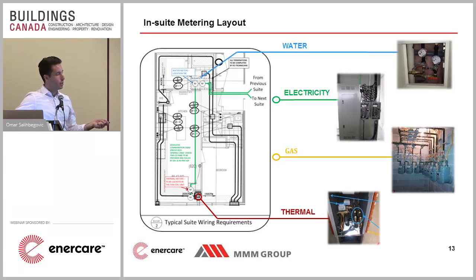Here are those gas meters that we were talking about. In this case, they were installed in the underground, just a mechanical room. And then you have our thermal meters that go directly inside the fan coil units. If you take a look at the layout, the thermal meters and the water meters are communicating via this communication cable. So again, this is something that would very easily be able to be integrated into the mechanical, electrical consultant's design and specifications, and it's most beneficial to do this earlier on, pre-tender even, if possible.